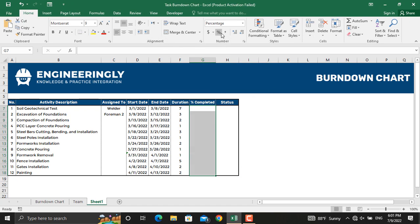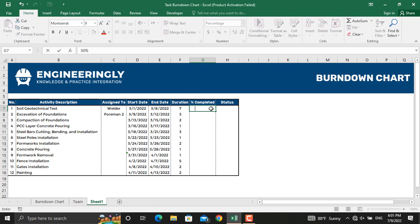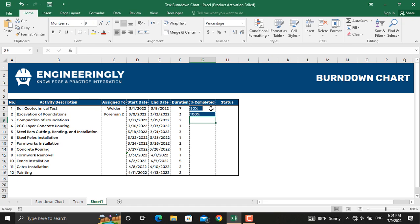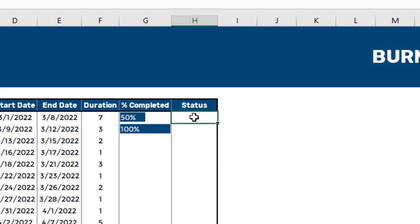Next, change the column format to percentage. Now if I write 50% or 100%, the bar updates accordingly. The last thing for our table is the status column: if an activity is 100% completed it should be called 'Completed', and if it is below 100% it should be called 'In Progress'.